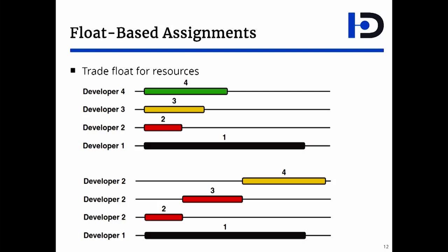But now developer two can jump to activity three. I can do the same for activity four. And this would, of course, reduce the float of activity four. But I can still do it with two developers. So in this case, not only did I do float-based assignment, I also traded float for resources.